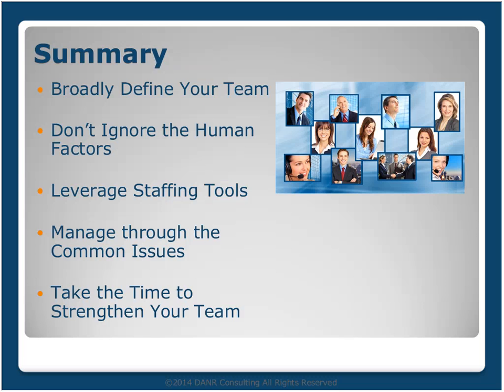So in summary, you want to broadly define your team so that it is inclusive rather than exclusive. Ultimately, your client and potentially vendors and other contractors or consultants can impact your success, so they are part of your team. When building and managing teams, don't ignore the human factors like communication or personalities because they will impact team effectiveness. And when building and managing your teams, also remember that leveraging staffing tools such as organizational charts, RACIs, and schedules help clarify roles and responsibilities and communicate key task accountability.